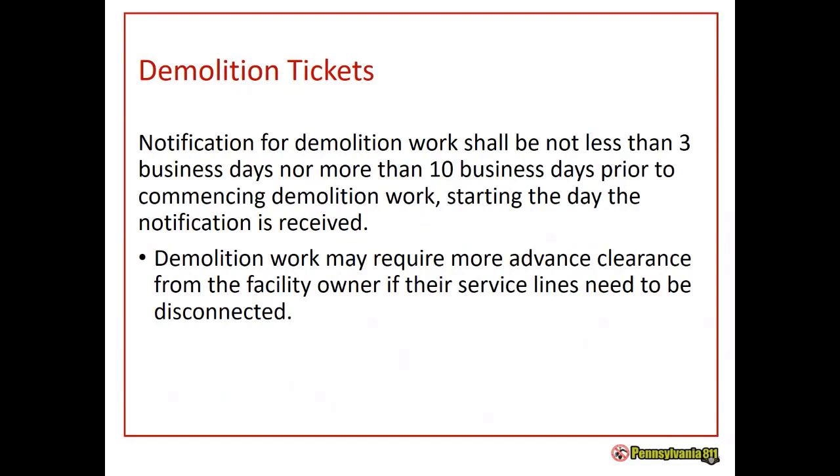Let's talk a little bit about the demolition tickets. When you're completing a demolition of anything, whether you are using mechanized equipment or not, a demolition ticket is required. You need to do the 3 to 10 business days. And then keep in mind, you might need some additional time to make sure if there are any service lines connected to the demolition project, that they have been disconnected for your safety and the safety of others.